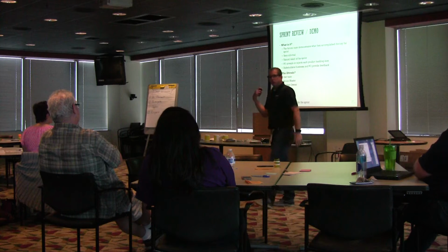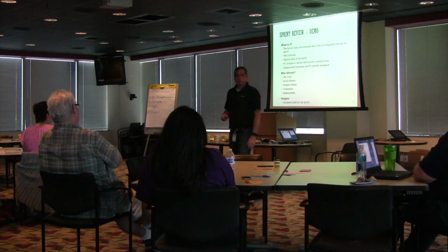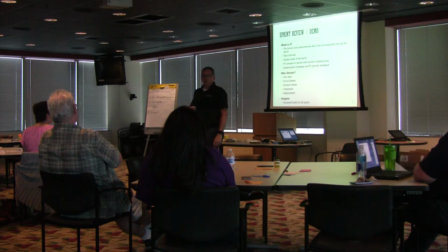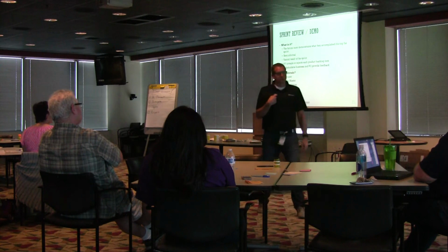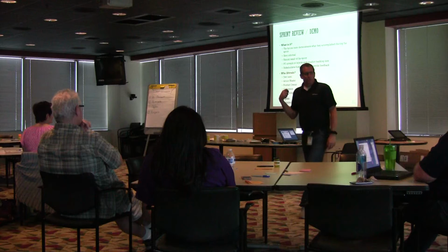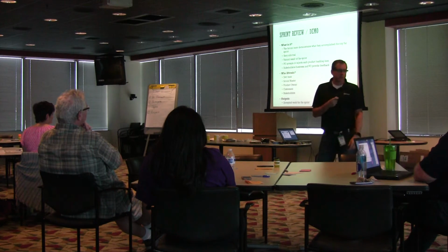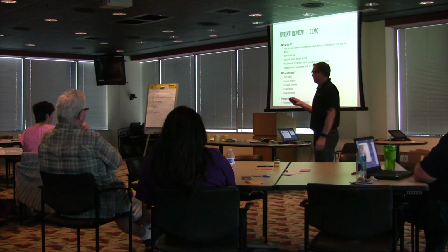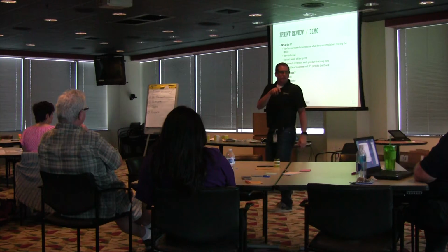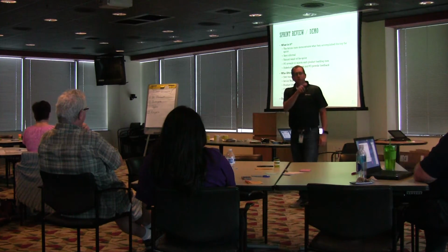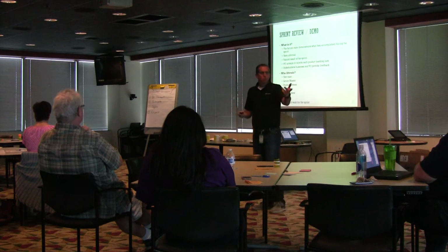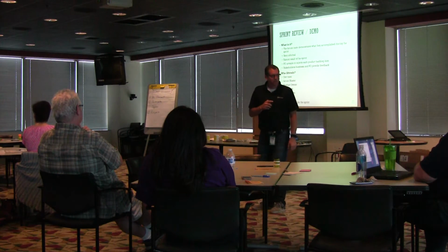Product owner is going to say, well, here's what we've defined with the stakeholder input. We're going to go ahead and accept this story because it meets the intent of the story. But what do you need now, customer or stakeholder, that's different from this? And I'm going to write a new story from that. So it's not the stakeholder necessarily approving those stories. It's giving us the feedback that we're on the right track. And then based on that feedback, we know what we have to do from there. Does that make sense? Does that help?